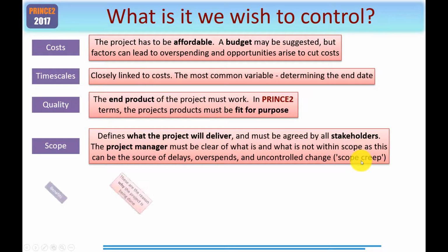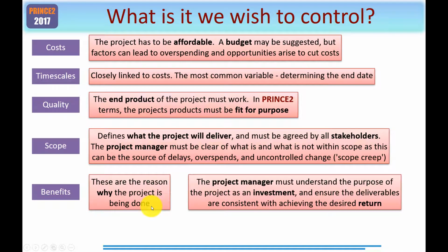And benefits, of course. These are the reasons why the project is being done and clearly articulated within the project's business case. Therefore, the project manager must understand the purpose of the project as an investment and ensure the deliverables are consistent with achieving the desired return. This is where the investment appraisal part of the PRINCE2 business case comes into play. And the key document called Benefits Management Approach will lay out exactly how and when these benefits are to be realised, who should be involved, what measurements will be used, and so on.